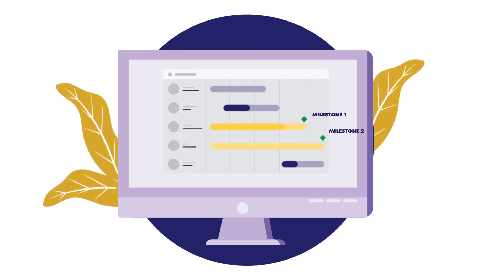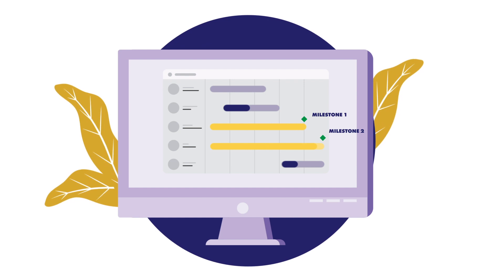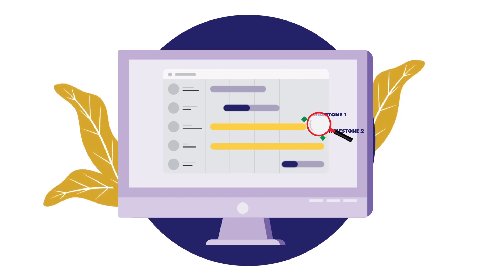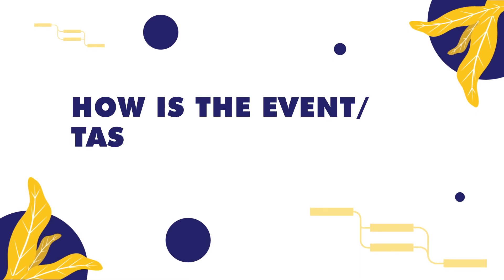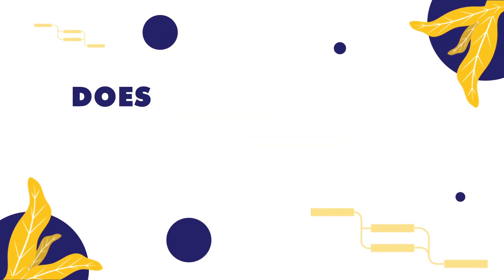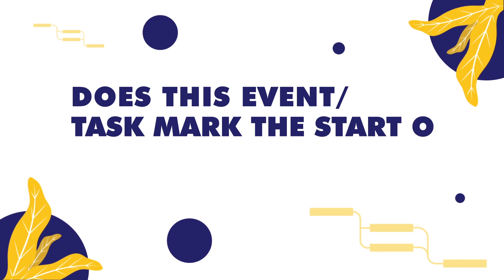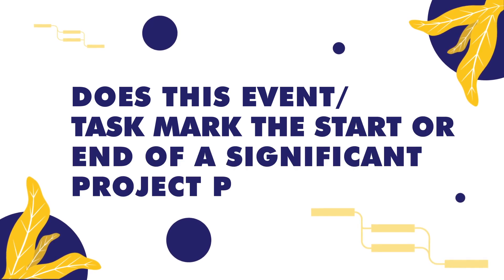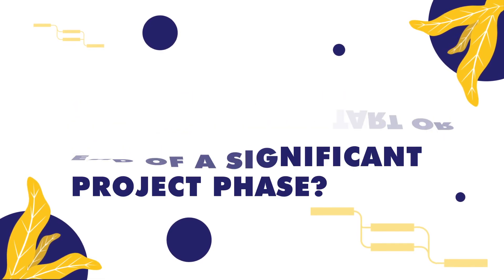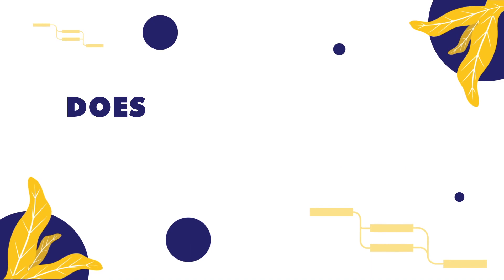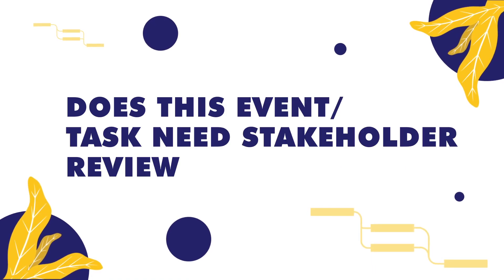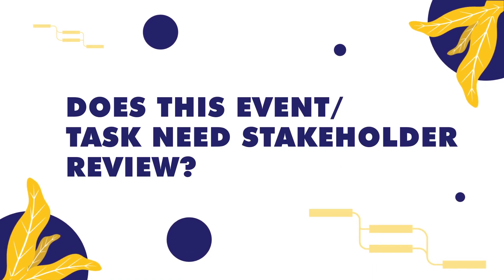To accurately identify milestones, ask yourself the following questions: How is this event or task significant to the project? Does this event or task mark the start or end of a significant project phase? And does this event or task need stakeholder review?